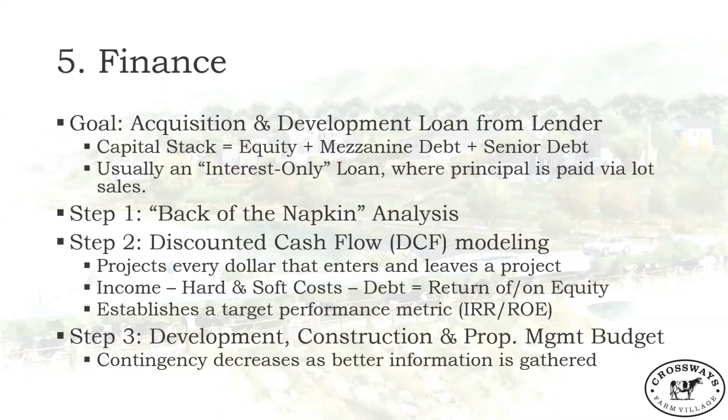And then your senior debt is the majority of the debt. It's the development loan you're actually carrying throughout the life of the project that you are going to pay back after the project's complete. It's usually an interest-only loan. So as you build something, you are basically paying back the principal after completion of the project. You're only paying interest during construction. And that's a key point too. What it means is that you're not paying down your loan for maybe 2 years, 5 years, whatever. It's not going to be 5 years, but hopefully. What that means is that when construction's over, you need to pay back the loan quickly. So that's finance. On to the next slide, please.